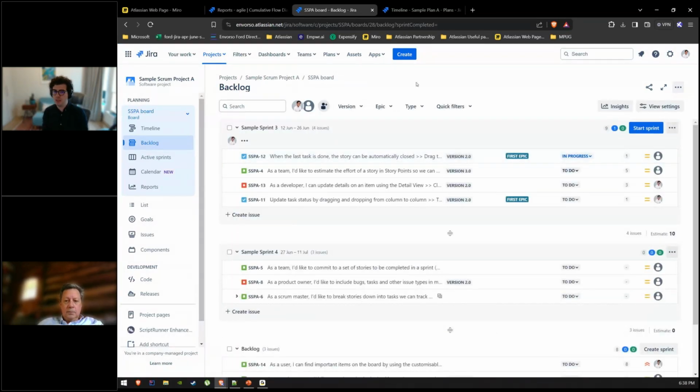Now, this is usually done during the sprint review meeting, where you demonstrate the work to your stakeholders. You see if you have any feedback. You see if they accept the work, if the work was done according to the requirements, and you finish the sprint.